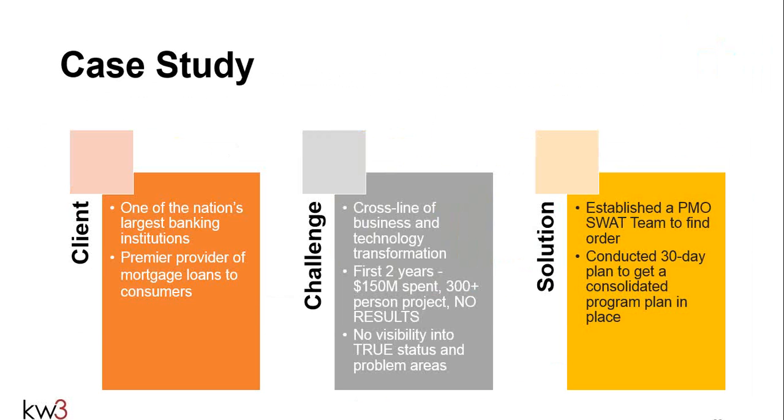And the success criteria for this one, at the end of 30 days, wasn't getting to 100% accuracy. It was getting us 80% there with some semblance of a plan, and then we could refine it as we go. So what we did is we led a triage effort, working with each one of the 25 teams: the business requirements team, technology development team, the architecture team, the human performance, change management, training team, all the teams.